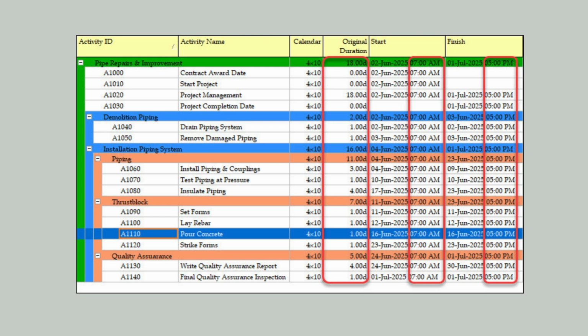If you erroneously set the 10-hour workday time period hours per day to 8 hours and then adjust it to 10 hours, P6 Professional compensates by multiplying the durations by 0.8. If you initially thought you were defining 10-hour days, then to correct durations, divide them by 0.8, which can be efficiently computed using the global change routine.